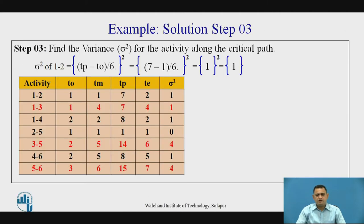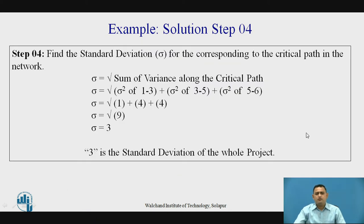As observed, marked in red, activity 1-3, activity 3-5, and activity 5-6 are the three activities on the critical path. Summing their variances: variance of 1-3 is 1, variance of 3-5 is 4, and variance of 5-6 is 4. So 1 + 4 + 4 = 9, and the square root of 9 is 3. The standard deviation of the whole project is 3.